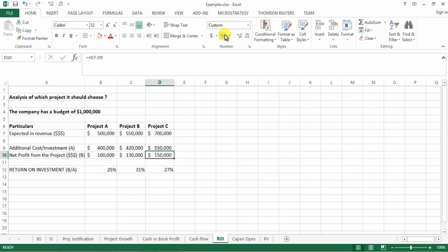If you just go by the absolute dollar values, you end up choosing a wrong project, which gives you a lower profit percentage, less margin, less return on your investment compared to the other opportunities in hand. Let's say over here we do some maths for project A also, and we decrease the cost just by $20,000.